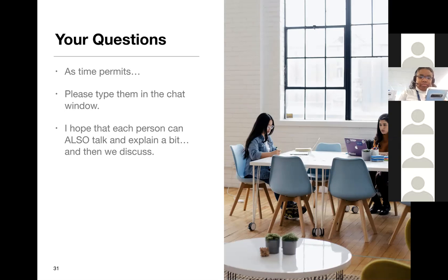I mean a lot. So here's one suggestion. Help them, because they're going to ask you, help them a little bit, put a time box on it, maybe a half an hour a day, but that's it. I'll help a half an hour a day on your questions, issues, concerns, but if I can't get it done in a half an hour, then you guys have got to do it. I'll help you a half an hour the next day, but that's all I'm going to do for today. So try to put a time box on it. I'm not saying half an hour is the right amount every time, but it starts to wean you and them off of the idea that you're going to be sucked into your old job.